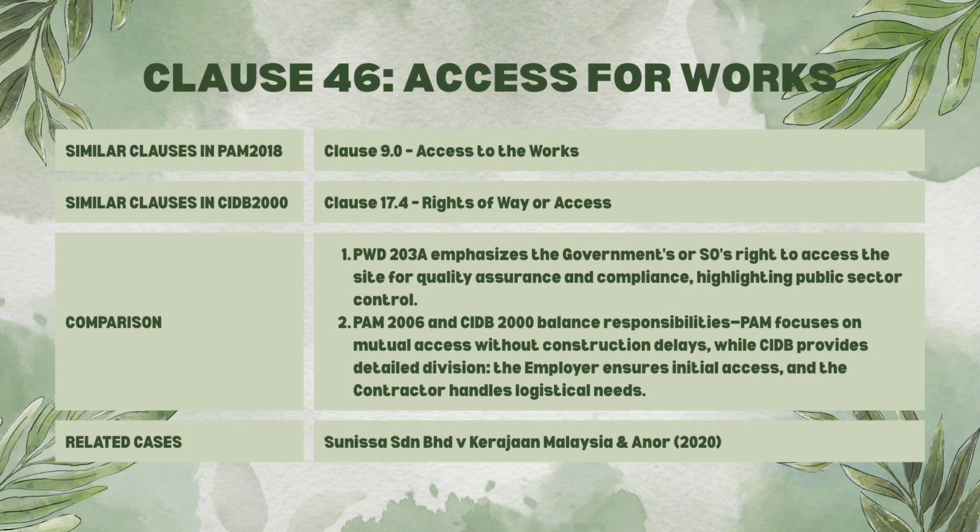PAM 2006 focuses on the mutual understanding that while the contractor controls access, the employer and consultant must still be allowed on site to fulfill their roles, provided their presence does not hinder construction progress. CIDB 2000 presents the most detailed structure by clearly splitting responsibilities.